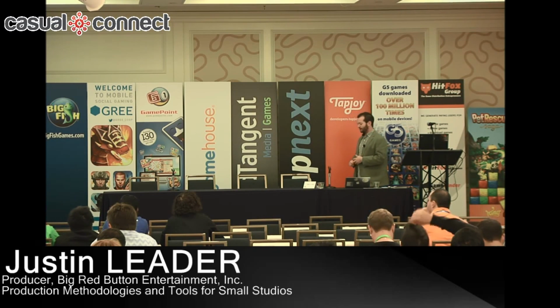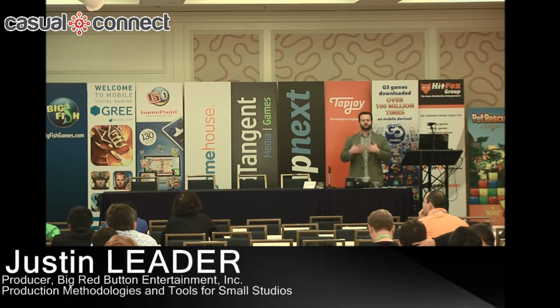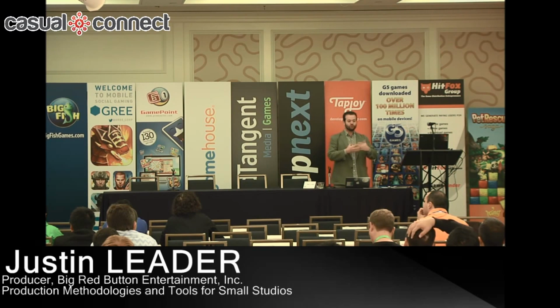Right. So Grand Theft Auto. I want to be able to. And you start with there's a syntax. So as a player, I want to be able to get away from the cops so that I can go blow up some more stuff. That's not a great user story, but what it shows you is who's the actor, who's the person the value is going to. So that's one disambiguation.